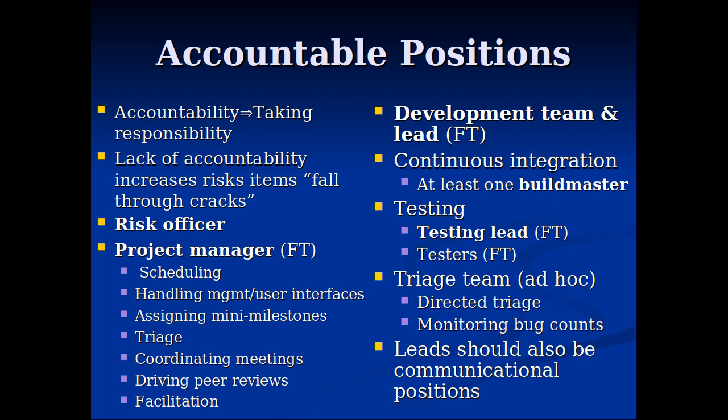What other competing responsibilities do they have? The average developer is not going to have that. Another issue is that developers and testers are involved in the operational delivery of the work. They're the ones thinking about how we actually accomplish this. Distracting them with dealing with the client is often problematic, because they get badgered by a client to add a feature and may just do it, just to get the client off their back, to the detriment of the rest of the project.